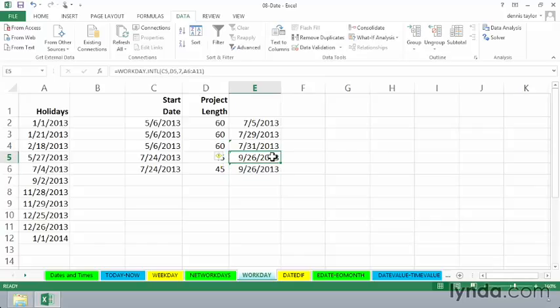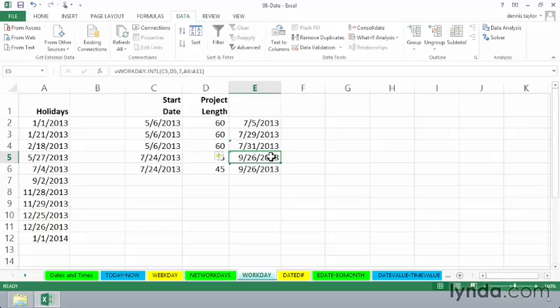So with the WORKDAY function and also its companion, net WORKDAYS, we do have the option in these calculations to include different kinds of weekends. But both functions are valuable in the sense that we do need to count days across multiple weeks and months and not include holidays and or weekends.